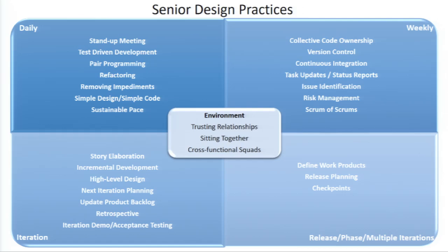We're hoping that that squad lead's going to start out with a stand-up and have his or her whole team stand up and talk about what they accomplished last time they met, what they're going to accomplish this time they meet, and then if they have any impediments. They don't solve it in the stand-up, but they grab those impediments, put it in their back pocket so that they can remove those risks, right?